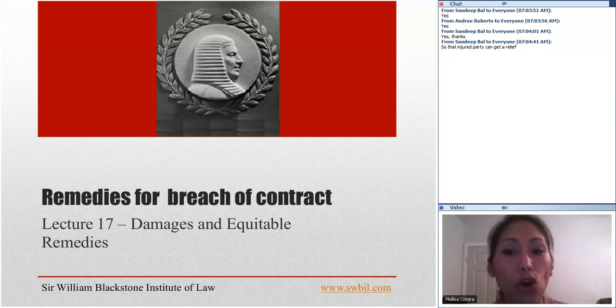Let's remember that not all losses will be recoverable. There are two factors that limit an award of damages. One is remoteness, which means that losses which are not foreseeable cannot be recovered. And mitigation means a party cannot recover damages for a loss that he could have reasonably avoided. That is the idea of mitigation. And in general, a party cannot recover damages for non-financial loss, such as injured feelings or distress. But we are going to see that this rule is somewhat flexible.